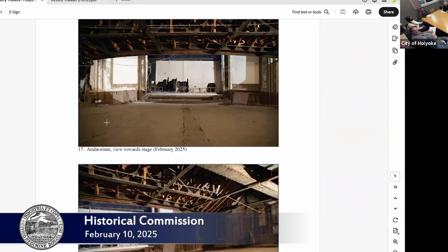And that has been, of course, difficult because of the alleyway. The first step that had to be overcome is to find a way for the fire department to have an access point to the alleyway to service any kind of fire issues in the alley. A plan has been devised by our architects and the contractors that went to the fire department, and they have given their approval of one particular plan.